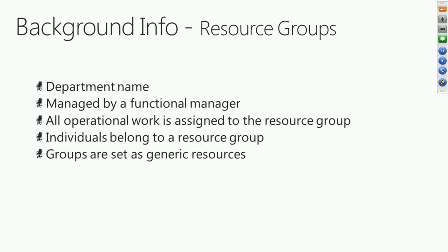It also allowed the project manager not to worry about identifying any specific people or anything like that. All they had to worry about was groups. So functional managers then would assign their people to a project as we would go through the resource planning. This is our preferred method. Or the project manager, with the manager's approval, of course, could also assign individual people to their tasks.